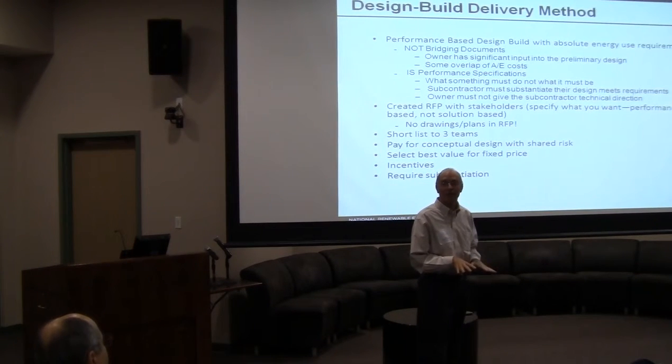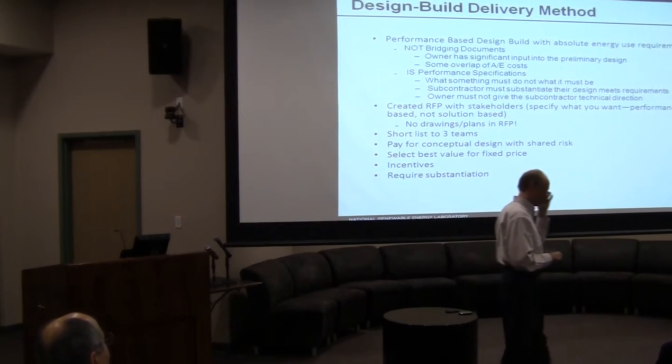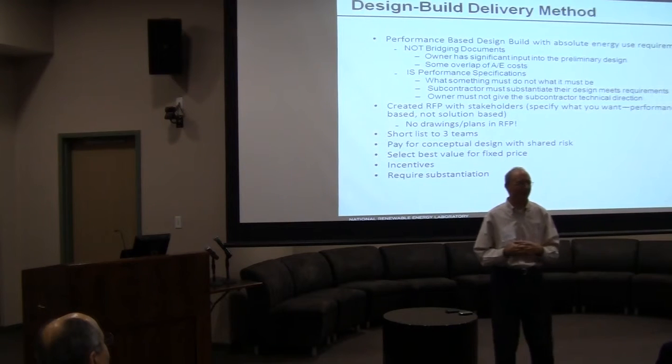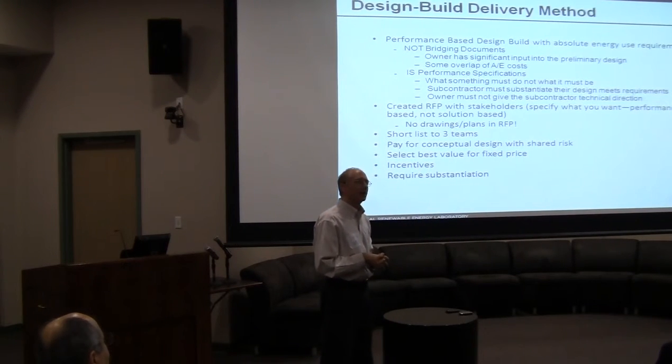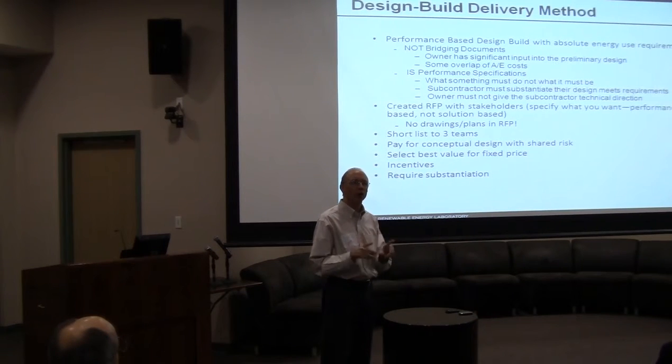And they had a choice. You could either rerun the model without the insulation, and guess what would happen then? They wouldn't hit the energy goal, right? And as in all good design and build, the penalty for failure is no payment. Okay? But it was amazing how much it did for the quality control by forcing the energy model to match the as-built condition.